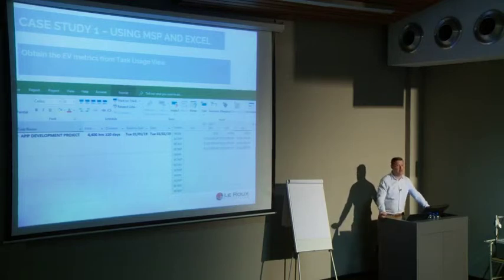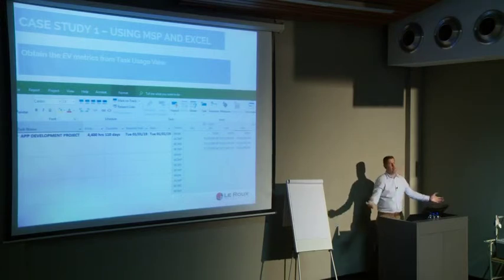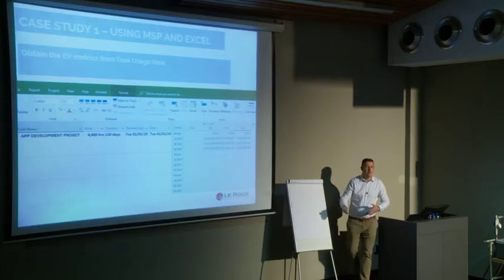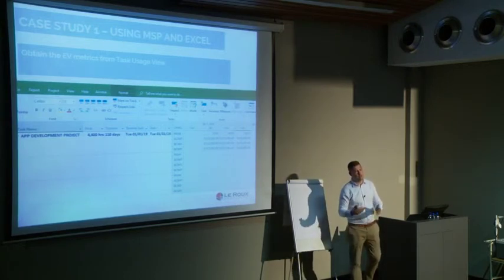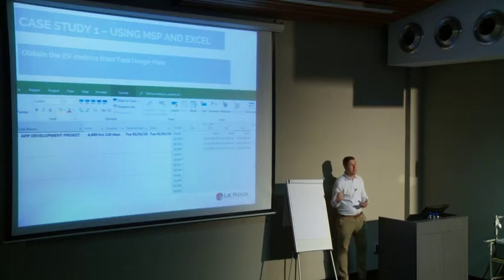Also, what we can do in MS Project is if one of your resources, let's say you have to substitute Jacob for someone else, Praveen, for instance, and Praveen is a bit more expensive, then we can bring that resource in, assign it, and then it will reflect in the actual cost immediately. So it'll spread Praveen's cost now over the activities that he's going to do, and we will see now a rise in the actual cost because we are paying this guy more. And remember, what did we plan for? We planned for Jacob, who is only 125 an hour. So the actual is actually different. We can bring that in, and it's measured immediately.